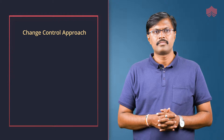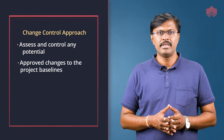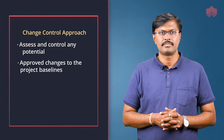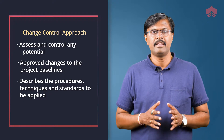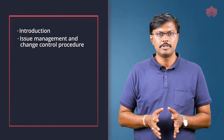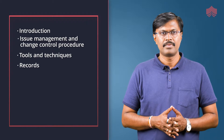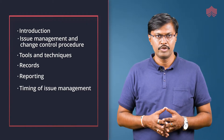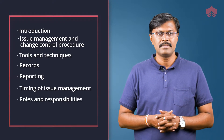Change control approach is to identify, assess and control any potential and approved changes to the project baseline. It describes the procedures, techniques and standards to be applied, and the responsibilities for achieving an effective issue management and change control procedure. Change control approach should capture: introduction; issue management and change control procedure; tools and techniques; records; reporting; timing of issue management and change control activities; roles and responsibilities; and scales for priority and severity.